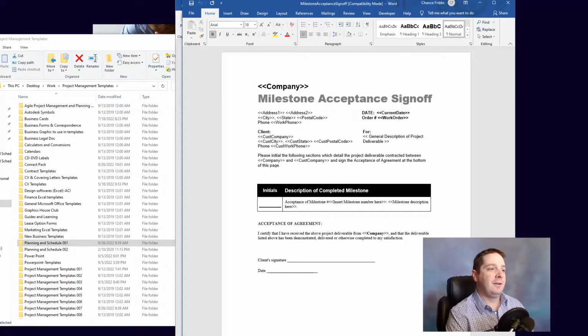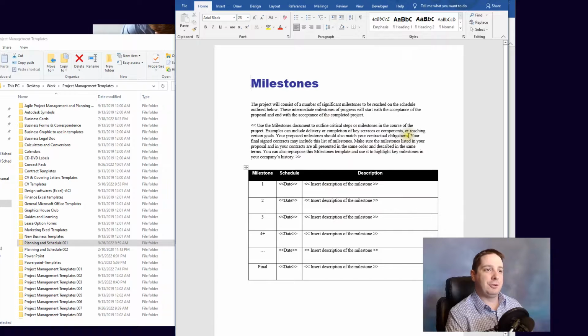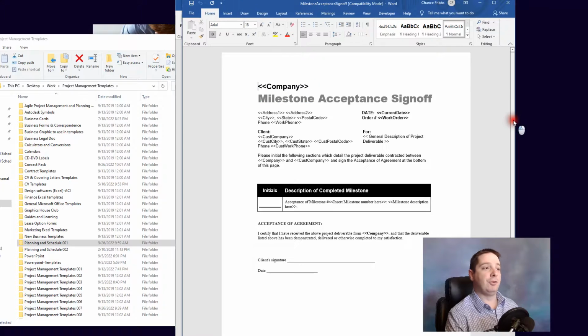I would take this milestone sheet, I would take it to them and say, this is what I plan on doing. And take also a resource scheduling type deal. In order to achieve that, we have to be able to take these resources and utilize them at these times. And here's the constraints. Here's the requirements. This is how we're going to achieve these milestones. And so here's an acceptance sign-off sheet.